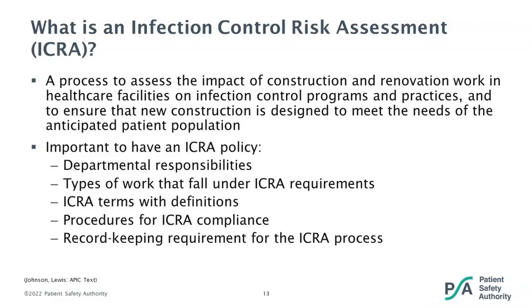Now you know you need to do an infection control risk assessment — but what's important to incorporate into your ICRA policy? First, you'll want to define departmental responsibilities so everyone knows what their role is and what's expected of them. Next, you want to lay out the types of work that fall under ICRA requirements. When you're starting out, it's a good idea to be involved in all project planning. Once you and your team are more comfortable, it could be possible for smaller or recurring projects to have a set procedure. You also need to define ICRA terms — you want everyone on the same page and speaking the same language.